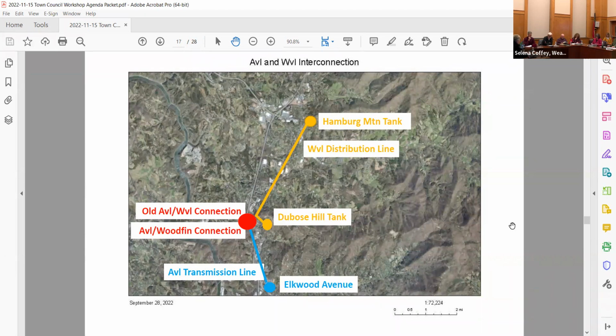So emergency water is very important because it's still going to require a significant capital expense by the town. What we've estimated is 14 million for the vault replacement, which would still be required by the city, an upgrade of the 2 miles of line, and then it would be a 3 to 5 year project. And then, of course, you see the amounts that we would have to pay for emergency water alone.